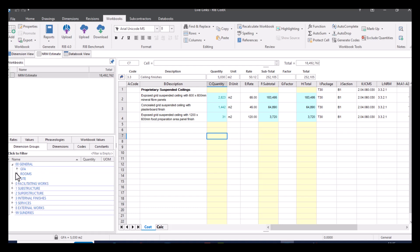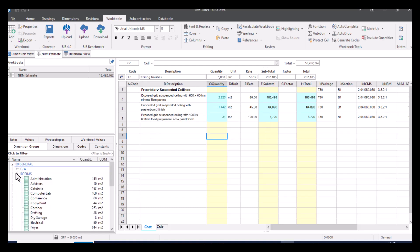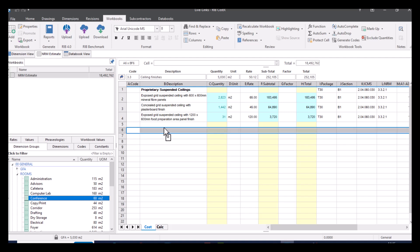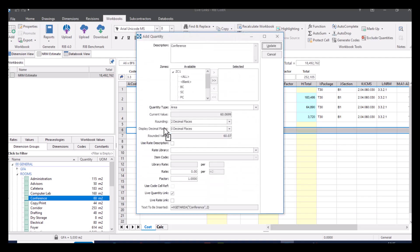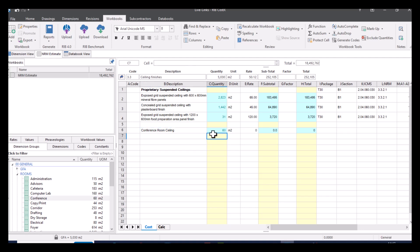Let's, for example, bring over some dimensions. Let's say we want to bring across the conference room. Pick it up, drag it across, change the description to conference room ceiling. We want the area, so that's fine. We can also change the rounding if we want to. But the important thing here is we want to make sure this is selected: live quantity link. So if you were to turn this off, then you'd get the numerical value, but it wouldn't be live linked. It would actually turn up in black text, letting you know that it's not live linked. If I update this, you can see that we've got our 60 metres squared here and we can just add in a rate that we need to.